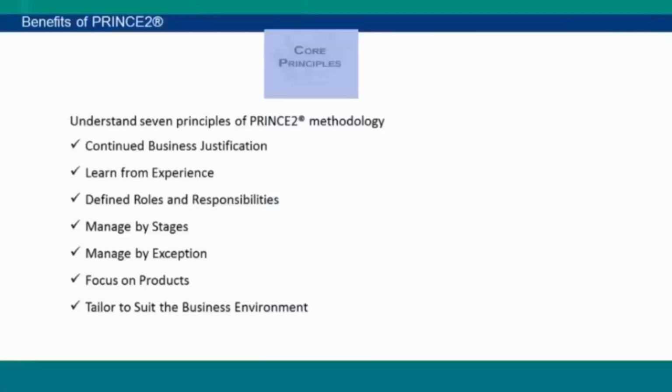If you have a limit and you are going beyond that limit, you need to take approval from your manager. Or the manager has a tolerance limit for those, so he will approve that. And if he doesn't have it, he will go up. So these are the levels we have, and these are the tolerance limits against the variables. Those are my six variables.